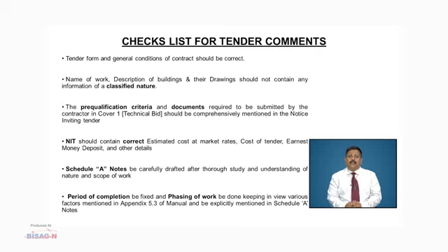Now the checklist to understand the tender comments. Firstly, the foremost check that is carried out is whether the tender form and the general conditions of contract are correctly mentioned and correctly entered in the tender. The check is also carried out for the name of the work, the description of the buildings and their drawings, and it is ensured that they do not contain any classified nature of information.